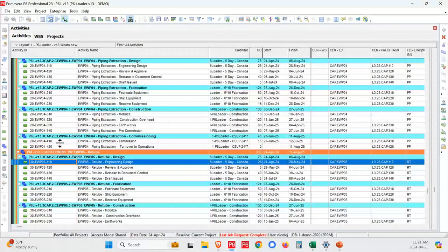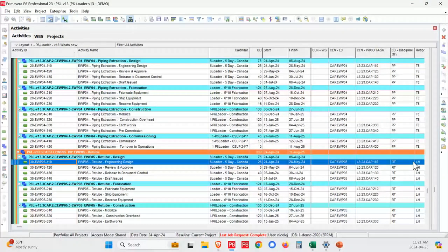And we loaded lots of projects, thousands of activities, I'd say over 10,000. Now it took us a while, not so much because of this part, but because of just getting the data sorted, right? The packages were changing, the numbers were changing, etc. The template was changing. I think I ran it 6 different ways with different templates. But without this, if we had to do all that manually, it would have taken at least 5 times as long, okay? So this utility is now available in this version.